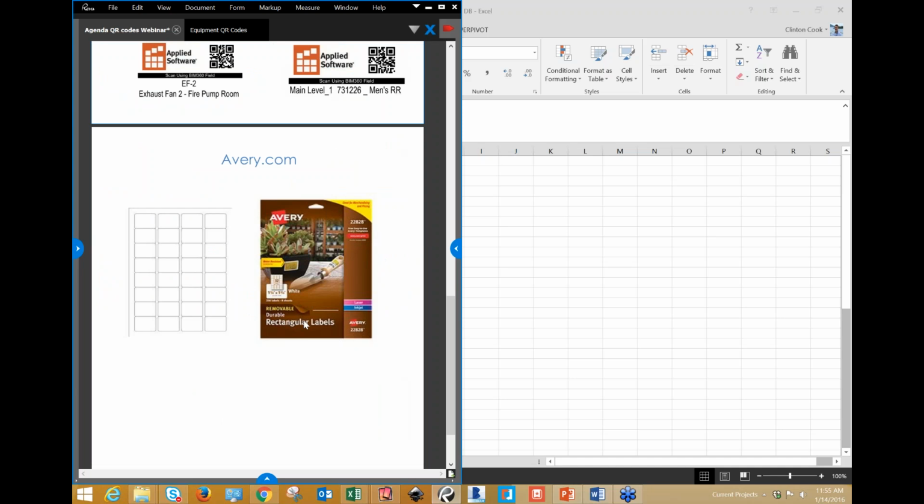And also keep in mind that if you are trying to work with QR codes for door hardware, and that's going to be exposed to the sun or the weather, you want to look at investing into a dedicated label maker and a dedicated software for that.